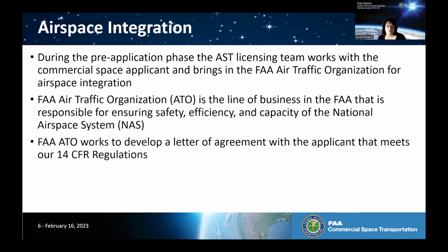During our pre-application phase, our AST licensing team will work with the commercial space applicant and bring in the FAA Air Traffic Organization, another line of business within the FAA, for airspace integration. The Air Traffic Organization is responsible for ensuring the safety, efficiency, and capacity of the National Airspace System, otherwise known as the NAS. And FAA ATO will work with AST as well as the applicant and any other involved parties whose airspace may be impacted by that operation to develop a letter of agreement with the applicant that meets our CFR regulations.